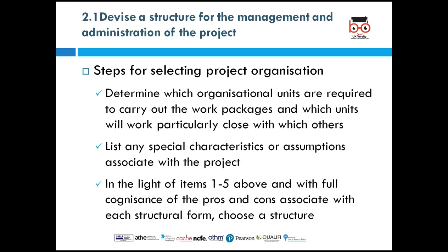And then look at which units will work particularly close with each other. In fact, if the electricians or the plumbers don't lay their pipes well, then the bricklayers cannot do their work. So those laying the plumbing work will work close together with the bricklayers.